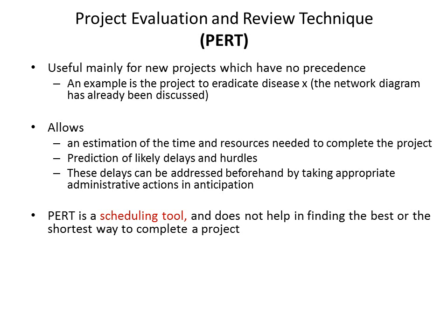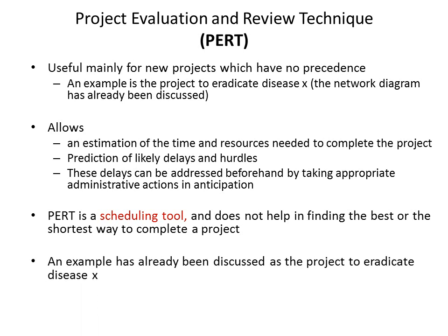That is, how each task will be completed, and if some tasks can run in parallel or some need to run only in series. A schedule is formed by altering the map a number of times and helps in finding the best way, but not the shortest way, to complete the project. It also helps in estimating the time that the new project will take, because this has never been done before, and the cost and other resources also, because again there is no previous experience. An example has already been discussed in the project to start a program for eradication of disease X.